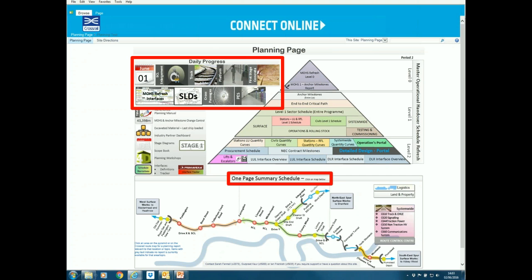But what this does is it has proven a very effective communication tool to the business, and what it has also done is cut down any conversations or phone calls in terms of what dates are currently being forecast, or what the schedule looks like for Bond Street, Tottenham Court Road stations, because people in the business know that they can just go to the latest version of the schedule, which in most cases is updated every period, so they can get the most up-to-date view of what the current programs are for any particular schedule.